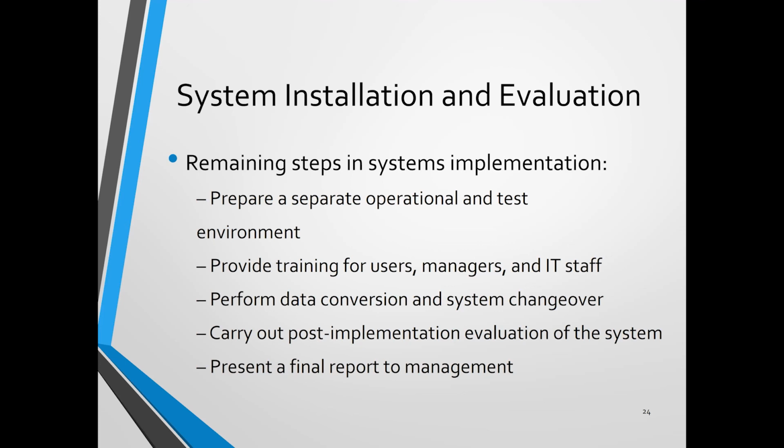and then you start converting. Why does data conversion take time? I can tell you that data conversion is normally not an automatic task. You download the data first, the data from the old system, maybe to your local computer first. After that you clean the data.